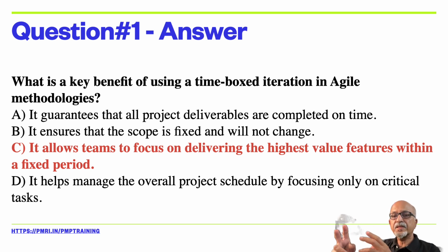So we give top priority to those high value features which can be delivered to the customer at the earliest, so that the return on investment on the new product can be speeded up. The second aspect is the risk element. If some features are highly risky, then we want to do them upfront so that we get more time for risk management.